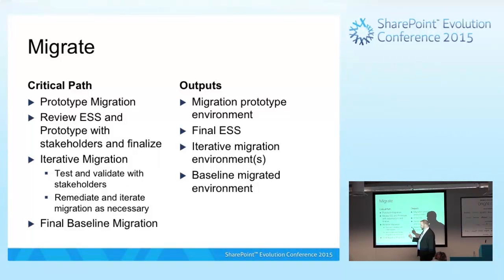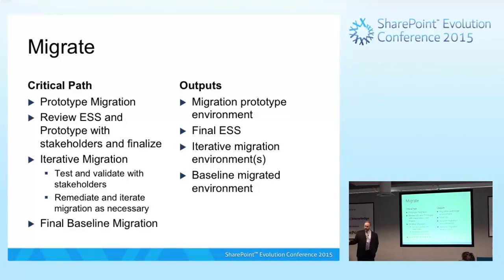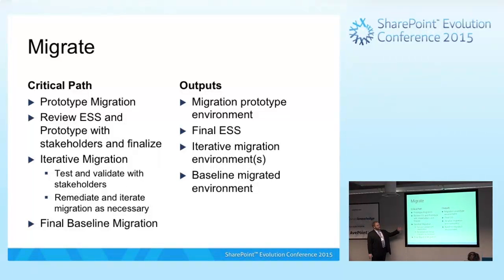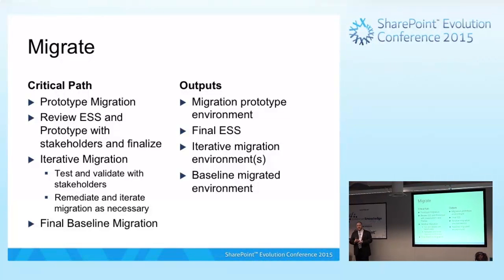The difficulty is building the map and the process that you use to define how your migration should transform your data. So these iterations could take a while. If you're talking about terabytes of information, it could be a week or 2 each time you iterate. You run that process, you kick it off, it builds a new baseline intranet, and then you bring it out, and you solicit feedback again. And you bring it out, and you solicit feedback again, and you should do this as many times as you possibly can before you run out of management backing for doing another one.